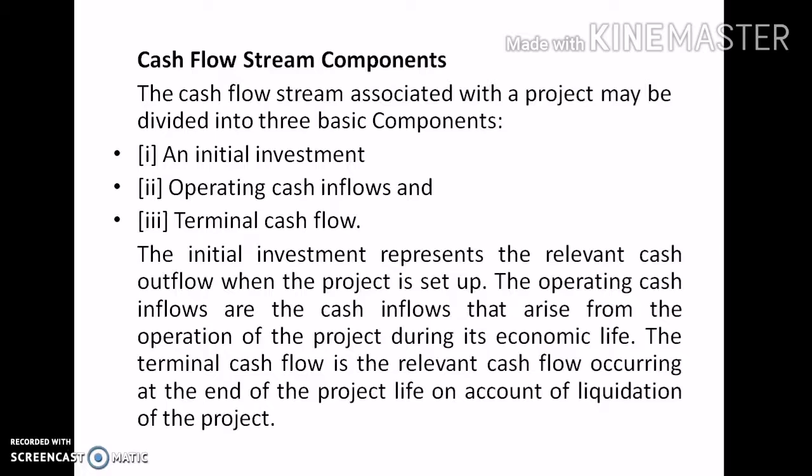The initial investment represents the relevant cash outflow when the project is set up. The operating cash inflows are the cash inflows arising from the operation of the project during its economic life. The terminal cash flow is the relevant cash flow occurring at the end of the project life on account of liquidation of the project. Let us measure all these cash flows in detail for a new and a replacement project.